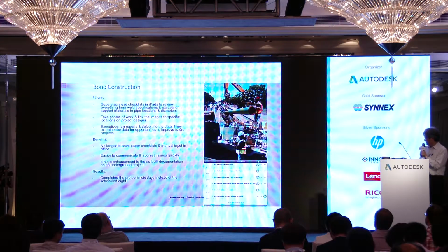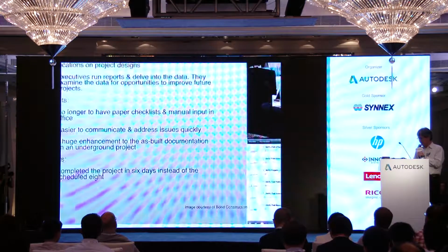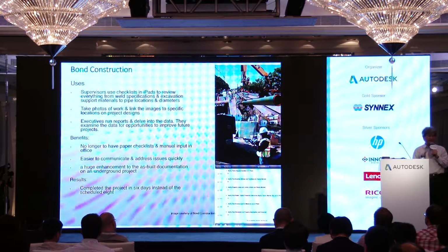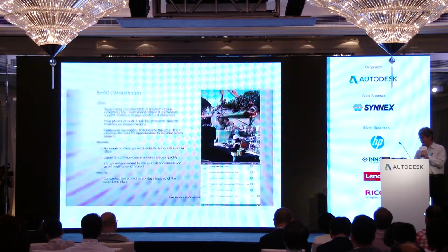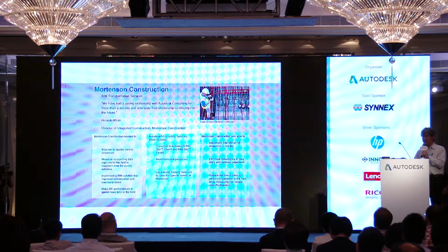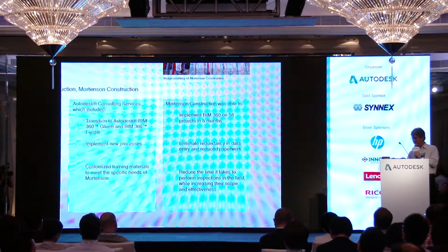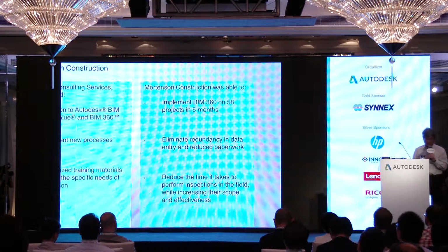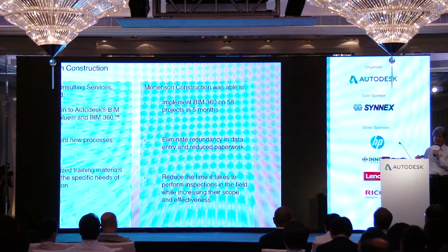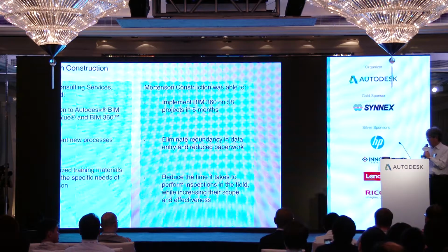So according to this, the experience is that they can shorten a cycle from an 8-day cycle into a six-day cycle. So you can see, well, the contractor saves a lot of money because they can do the whole project much faster. Okay, it's almost they save 25% of time.